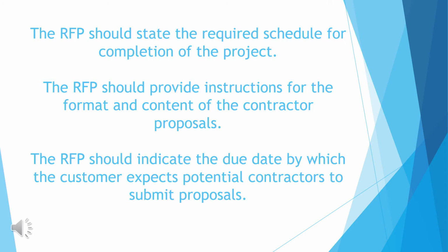The RFP should provide instructions for the format and content of the contractor's proposal. The RFP should indicate the due date by which the customer expects potential contractors to submit proposals.